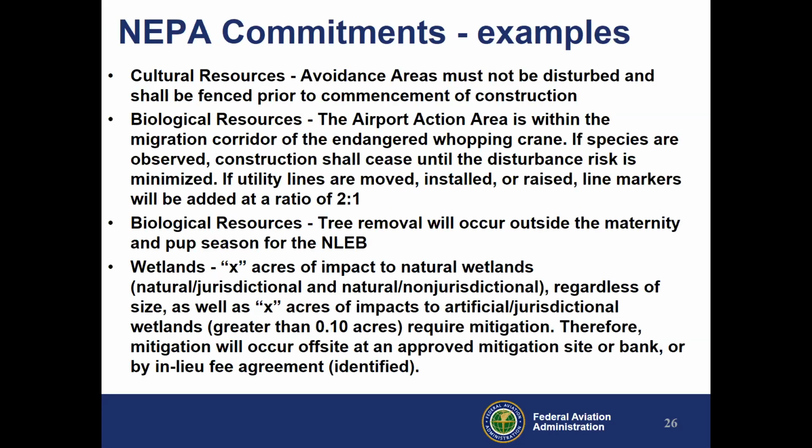Some of the examples that we've used in the past on commitments, for example, cultural resources, we have avoidance areas that are not to be disturbed, and we fence them prior to commencement of construction. We include that in the commitments in the document as well as the plans, and it was included in the design and shown on the plans.